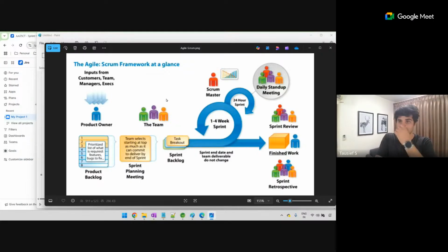But in such cases, the manager or tech lead is not going to force you. They will only be raising thoughts. We feel it can be this much of time. You have to say, if you say more time, bargaining will happen. Tech lead says it can be done in 2 days. But you say, no, it will take 4 days to complete this. Then you have to justify. Why 4 days? Can you give a day-by-day breakdown? In day 1, what can be done? In day 2, what can be done?